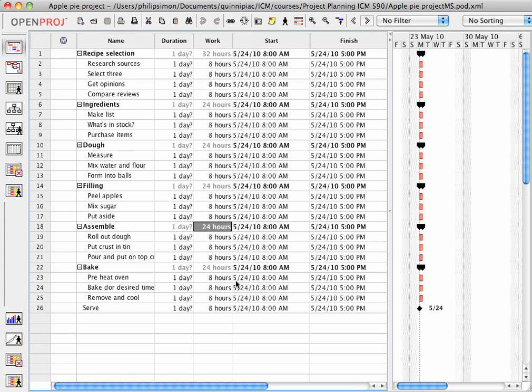First step in continuing to build our schedule using Proj is to enter the hours in the work column. I would take this from your work breakdown structure. For the purposes of this exercise, let's work with your worst case estimate.